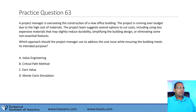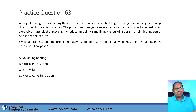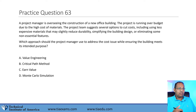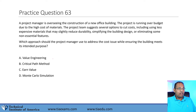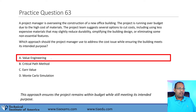Question 63. The project manager is overseeing a construction project running over budget due to high material costs. The team suggests options to cut costs: using cheaper materials that may reduce durability, simplifying the building design, or eliminating non-essential features. Which approach should the project manager use to address costs while ensuring the building meets its intended purpose? This is a definition question. The best answer is value engineering.